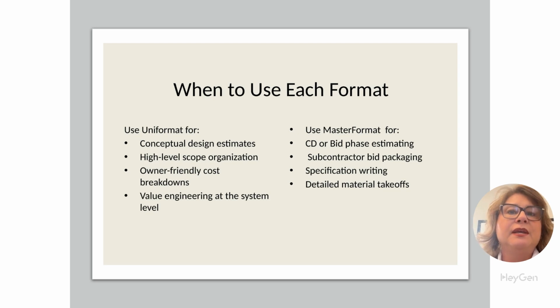Think of it like this. Uniformat equals big picture systems. Master Format equals material specific detail. You'll often use both on the same project, just at different stages and for different audiences.